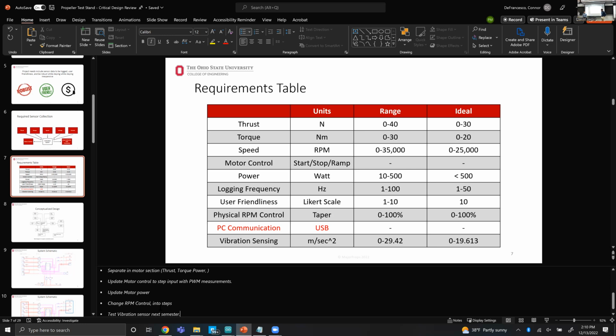I think your team will benefit from this, especially that you have others. You can even share it with Dr. Jemmy. He can also see, it's just observation, right? He's supervising, like, if you want to check our progress. It's better than a Gantt chart, because a Gantt chart is good for the big picture, but it has February, March and April, like overwhelming. We just want to know what's happening in the next 2 weeks. That's why this becomes very useful.